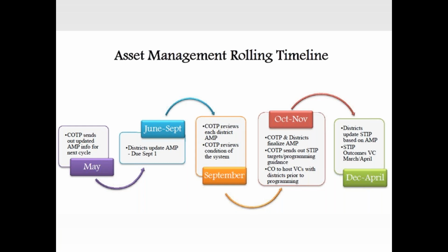It's the asset management and performance management goals that drive the projects selected in the STIP. Remember, the locals are the ones who start the prioritization process. So each MPO and RPC brings a prioritized list developed with their stakeholders to the district. When each district meets with their partners, the asset management and performance management goals are incorporated into the prioritization process. So it's the district and planning partners who determine which projects will be programmed into the STIP based on these goals.